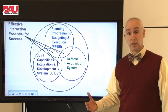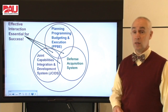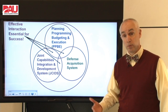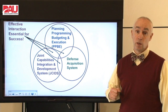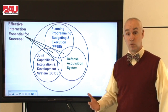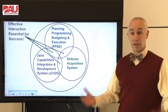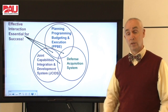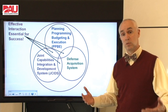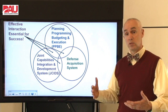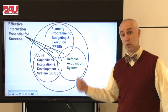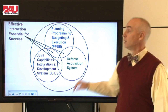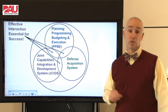Making these things work together is not easy because PPBE tends to be driven by the calendar — it's a once-a-year process to budget money for programs and program money in the out-years. The JCIDS system tends to be need-driven; needs are coming up all the time, so it has its own pace. Our Defense Acquisition System is an event-driven system — we want to get the data, testing, and design ready for our Milestone Decision Authority to have confidence in the next decision. So making something event-driven work with something need-driven and something calendar-driven tends to be a big challenge in acquisition.